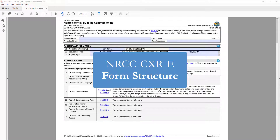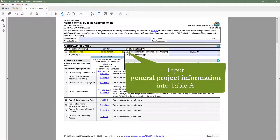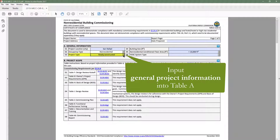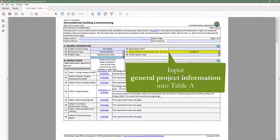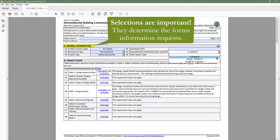Now let's cover the basic structure of the commissioning form. The documentation author will indicate general information in Table A, such as occupancy type, project type, and conditioned floor area. These inputs are important because they decide which tables to trigger throughout the form.